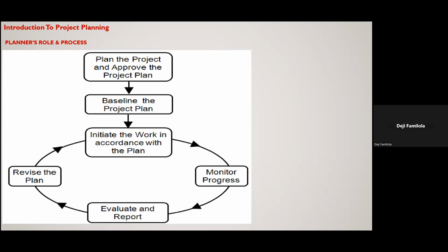And if that involves a sponsor that is not within your company, or a client, then that needs to be sent to the client to review. Once the client is happy with what you've put down and agrees, then it becomes the project or program baseline.